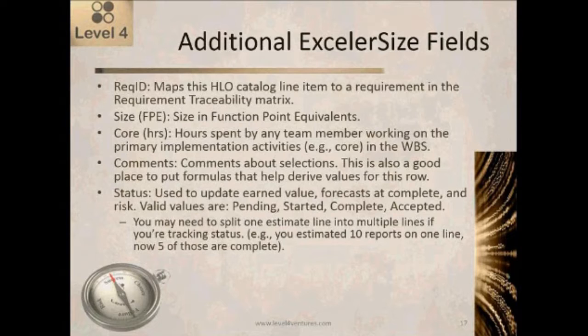And if you ever want to look at what's driving the work, you can use this to determine, okay, so if something is 1/10 of the function points of the entire project, it is going to represent 1/10 of the work. So the function point equivalents are the building blocks of how we're calculating size.